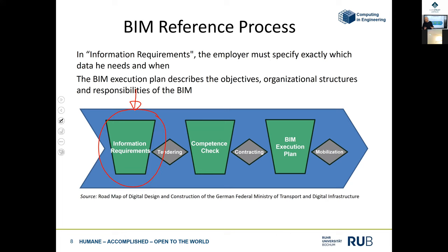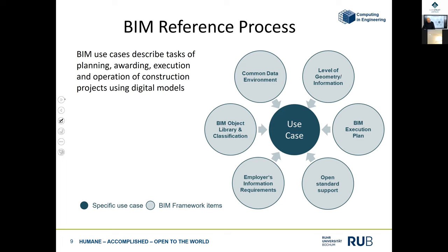So we did this in several pilot projects, and I will come to some use cases in a second. Use case is a good definition, because if you talk about this, we have different tasks to do during the planning. Sometimes you need a model, sometimes you need additional information. So we started to structure all the tasks in the process by so-called use cases. I think other countries and organizations did this in the same way. And then you have to think about what I need to perform this task, this use case.